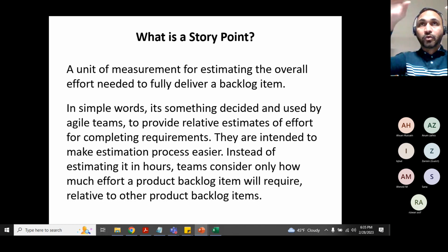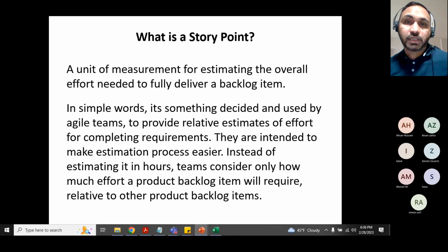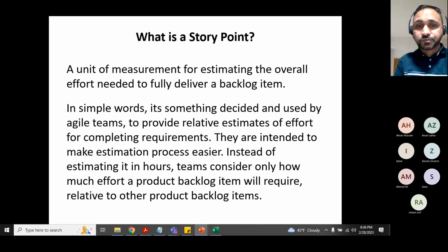Remember, backlog means the overall wish list of a product owner, not specific to only a sprint yet. We are not there yet. From an estimation standpoint, first of all, you have to estimate a high-level overall effort of the whole project, and then break it down into the smaller iterations, just like sprints, and then do a refinement again. That is one of the reasons backlog refinement and backlog grooming are continuous ceremonies. They are never-ending, non-stop ceremonies that you have to execute during the Scrum adaptation.